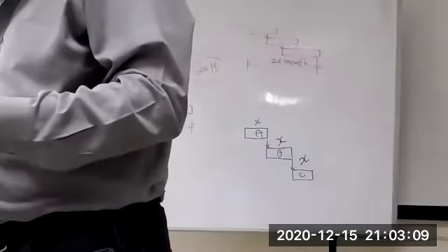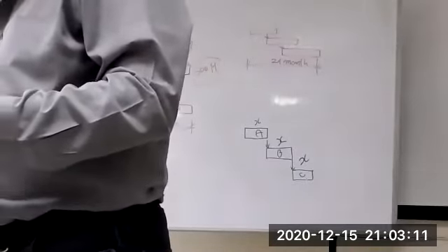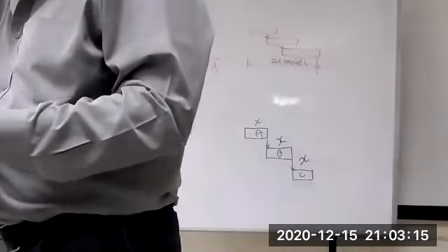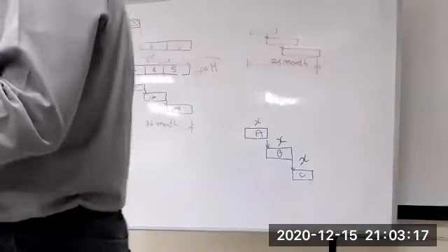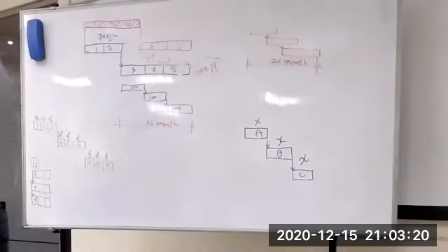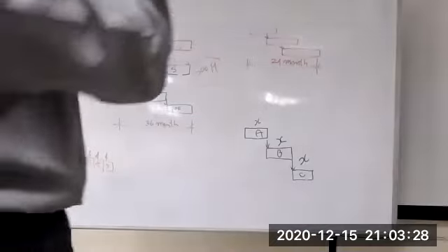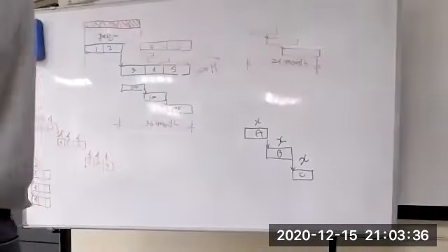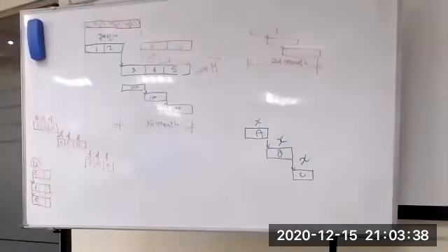Activity on arrow, activity on node. We have types of networking: activity on arrow, activity on node, and PDM. We have fast tracking and crashing. In the end, we have crashing and fast tracking. Crashing versus fast tracking: crashing increases the project cost. Fast tracking increases the project risk, which is quality and safety.